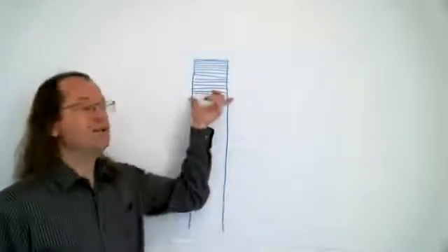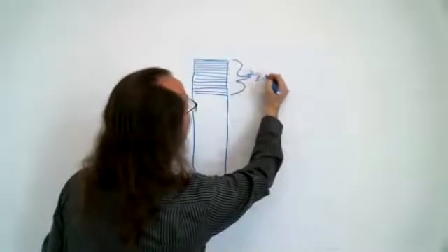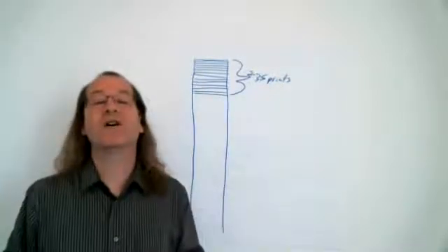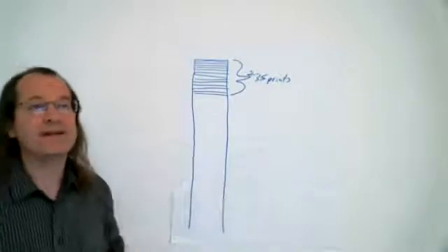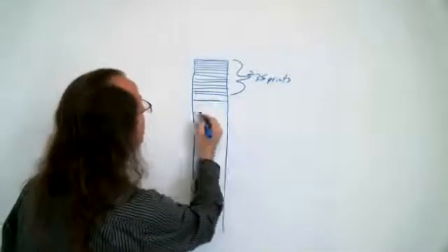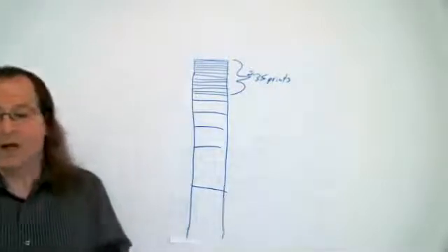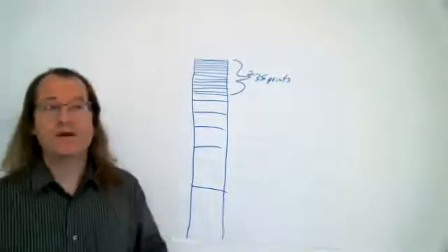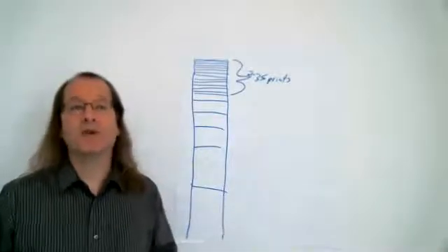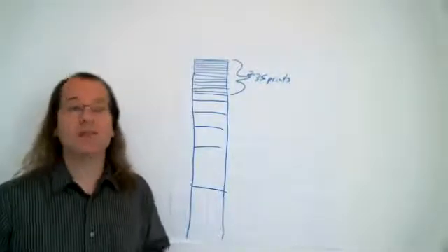So we want, in general, 2 to 3 sprints worth of sprint ready stories up at the top of our product backlog. Then below that, what I want is the items to gradually be bigger and bigger, right? So, gradually getting larger and larger until down here at the bottom of my product backlog, I could have some really large items, right? I might have one single product backlog item that's going to take, who knows, 3, 4, 5 months to get that one item done. But it's okay because it's maybe 9 months out in our product backlog. So it's fine that it's still really large.